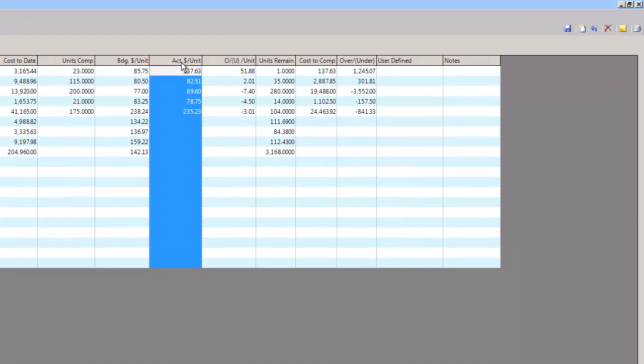If I have my actuals for the last 3 or 4 jobs, I can come up with a new budget. At least I have something to bounce it off of, and not, and I know you guys are really successful, the seat of the pants or a wild guess. It's kind of like, hey, I came up with $82. I think this is just like the other job. What did it really cost me on that job? We can go back and verify that your budget's still looking pretty good.